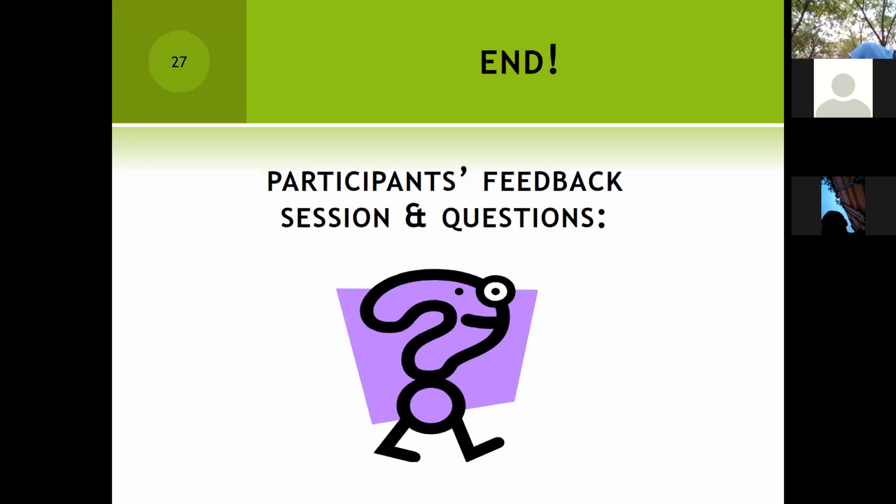But what we're saying is that the process of monitoring is better conducted inside the organization, because it involves a lot of collection of assessment data for how the project is continuing. And that is why sometimes we say we may not be able to contract an external person to do our monitoring, because that's something that we expect to be capturing as the project happens.